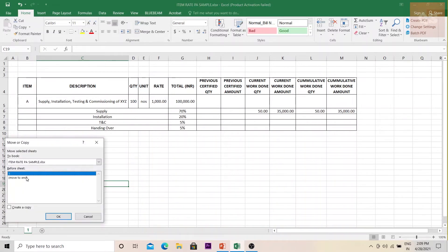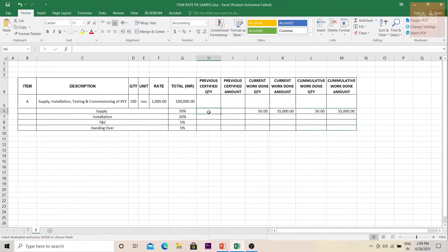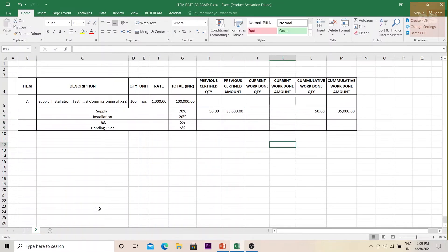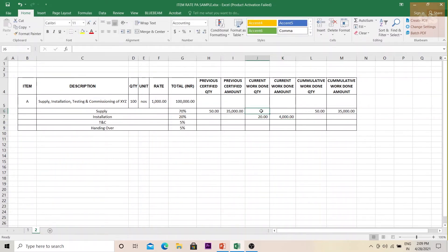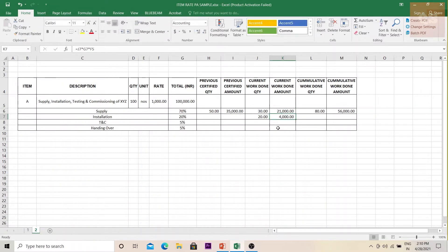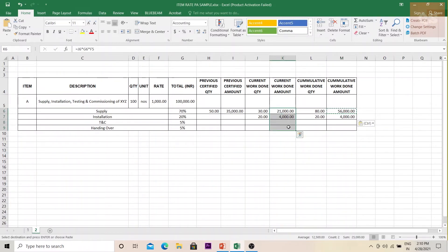For the second invoice, the previous cumulative becomes the new 'previous' column and we clear the current work done. In the next month, 20 of the 50 supplied items have been installed, so under installation we enter 20. The claim is 20 × 20% × 1,000. Additionally, another 30 items were supplied this month, so we also claim 30 × 70% × 1,000. The total current work done for this month comes to 25,000.